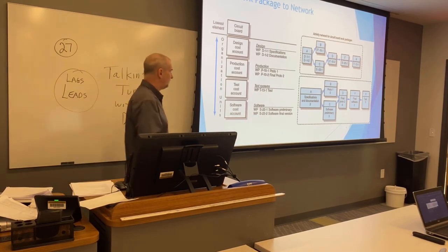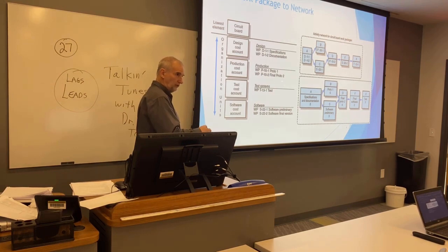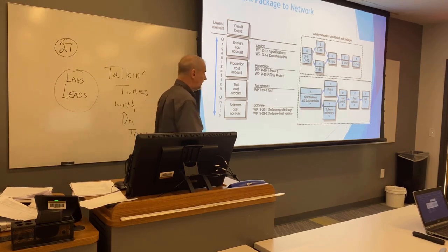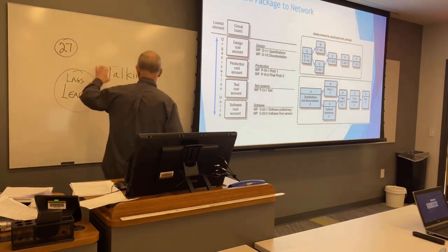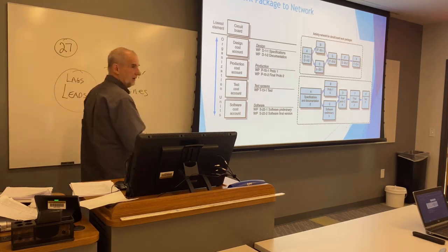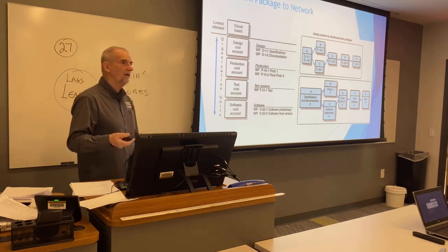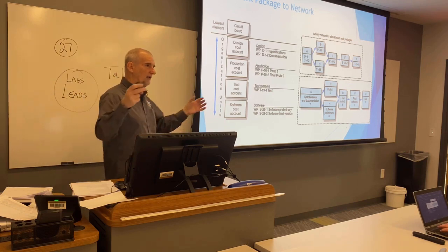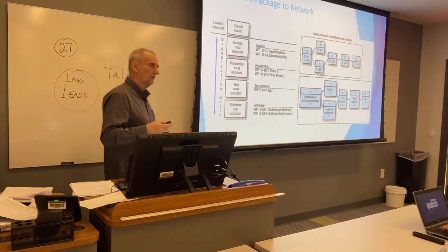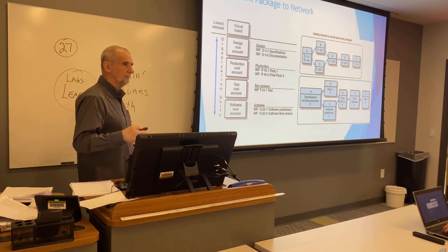Okay? So imagine you had 7 Post-it notes here, 1 for each one. You're going to take the Post-it notes and you're going to put them on the board here in this kind of order with your team. And if you don't like the initial order, what are you going to do? You're going to change the Post-it notes, aren't you? And it can be very easy and very fast. So that's how you put together your network diagram.